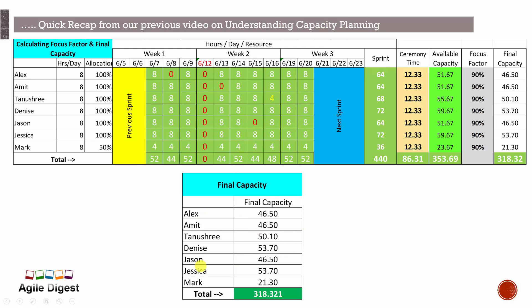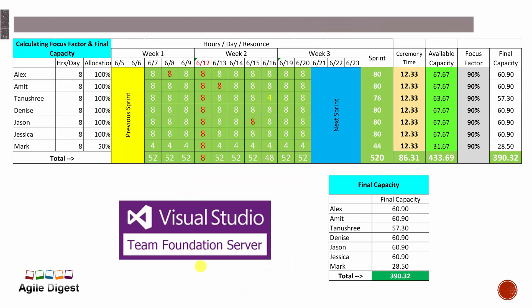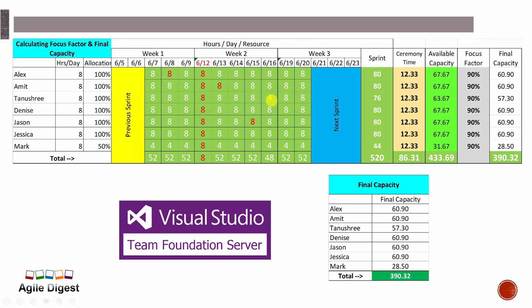That's the final capacity of everyone. But once we'll be doing it in TFS, you will be seeing that TFS automatically has options to take care of this team holiday or individual holiday, so we'll not be deducting manually. TFS doesn't have options for partial holiday, so we'll be calculating the partial holiday in our Excel or somewhere. So the total capacity coming is something like this.